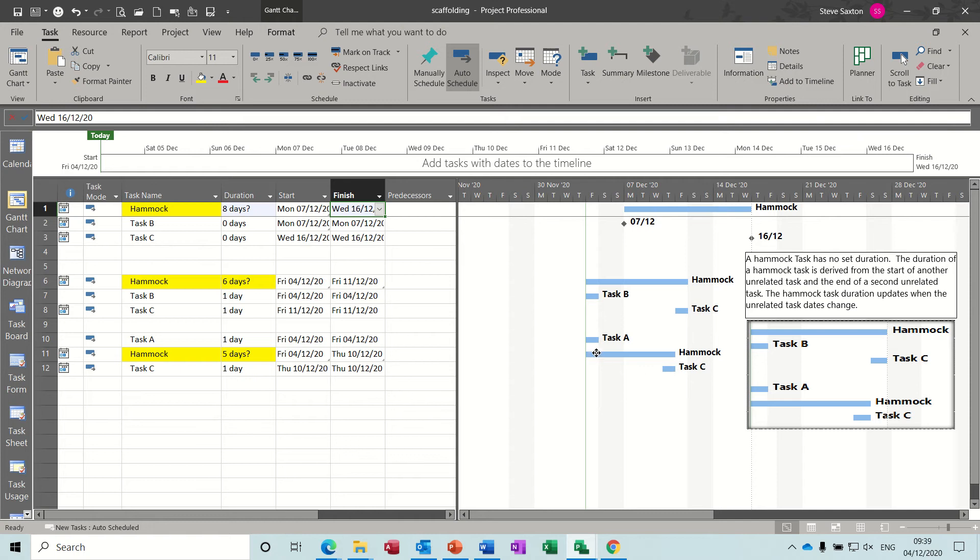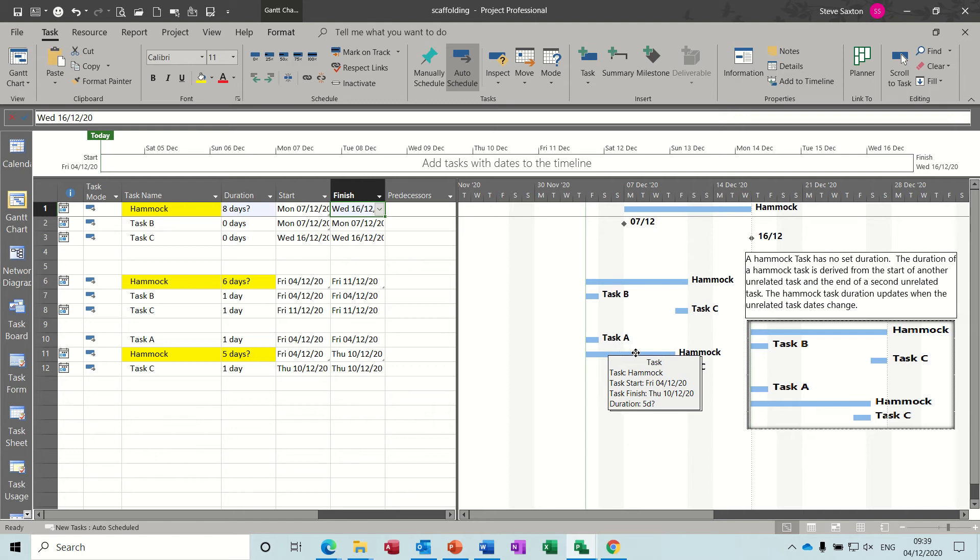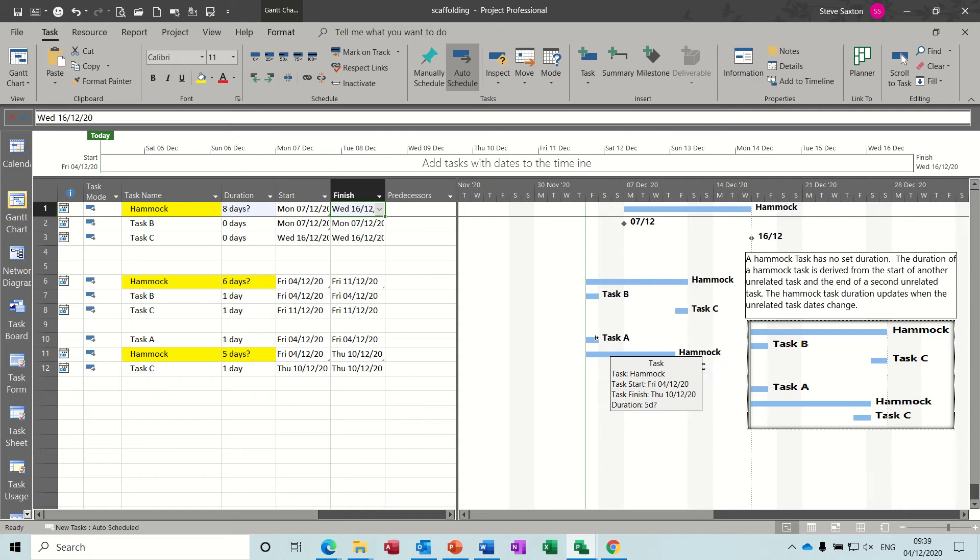So we don't know how long this is going to be, but it's going to be the length between these two tasks. Now that could be the start and end of the project, or it could be the start and end of a particular phase of the project.